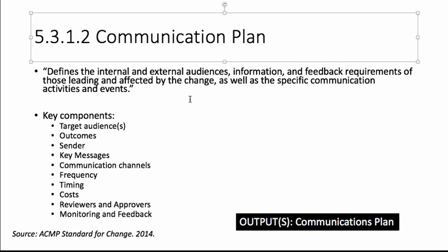Frequency specifies the number of times key messages will be communicated in selected channels. Most change activities require a relatively high frequency of messages being communicated to stakeholder audiences. Timing defines the schedule for communication activities. This ensures the timeliness of communications and prevents communication overlap for multiple stakeholders. Reviewing non-project communications against the change communication plan can avoid saturation.